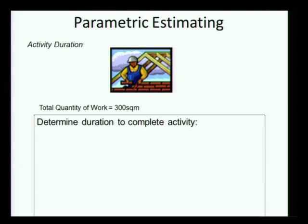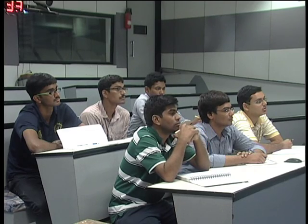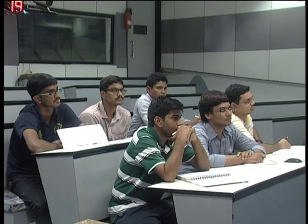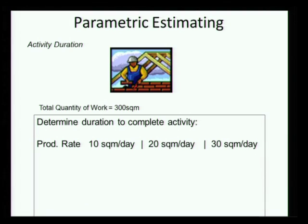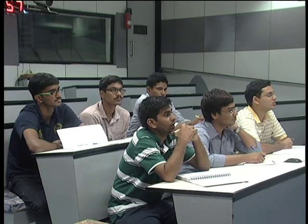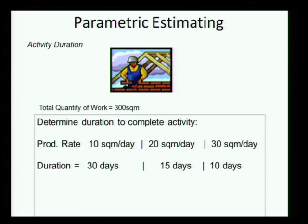Taking this analogy to a construction context: here is a masonry activity with a total quantity of 300 square meters of block work. What would be the time required to complete it? I need something equivalent to speed — a production rate. If the production rate is 10, 20, or 30 square meters per day, then the time required is 30, 15, or 10 days respectively. That is very straightforward — when we say a day, it means 30 working days at the defined work hours.